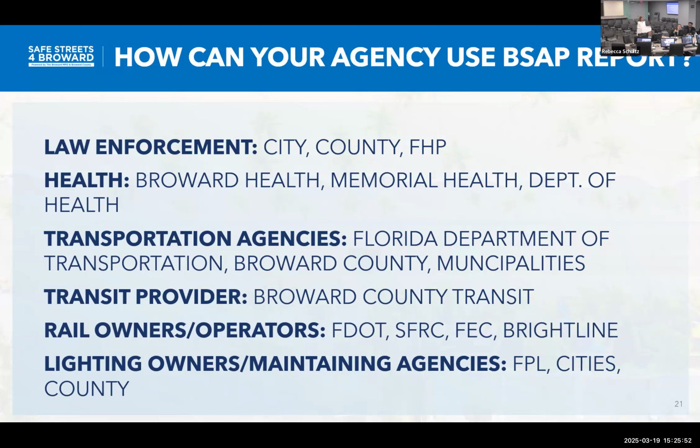There's a lot of projects too, so we understand that not everything will go forward the first year and could always go forward the second year. And then it's an amendment to the MTP, and then we put it on our list of prioritized projects in January, February, which then goes forward to FDOT, which then can assign funding in the draft tentative work program. So there's a process and a cycle there.